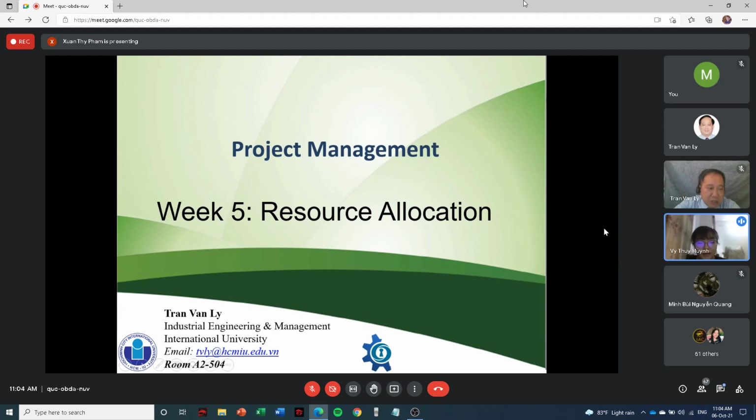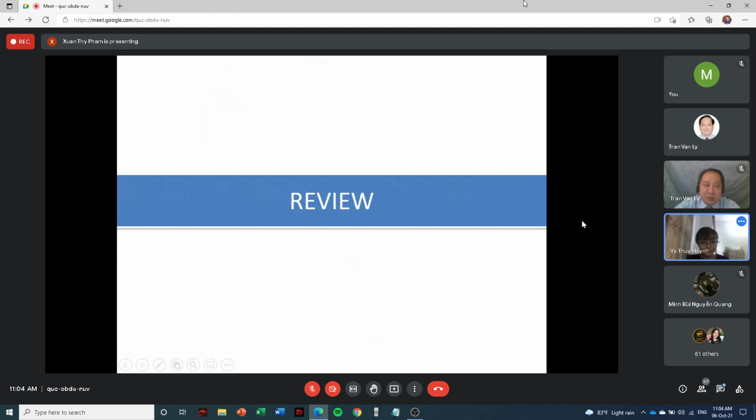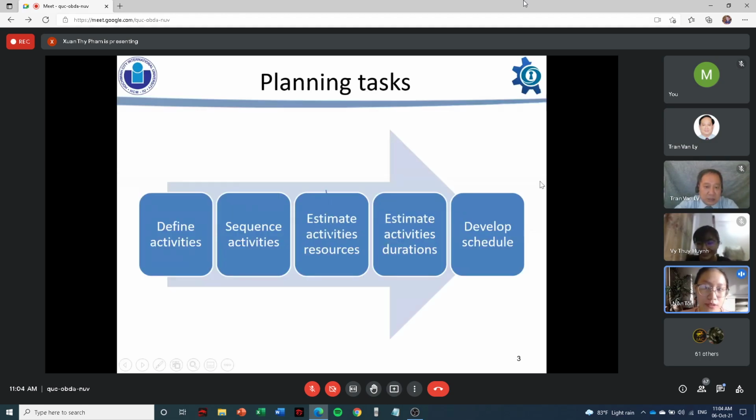First, we will start with Minh Uyên for the last week review lesson. Thank you. Hello everyone, my name is Uyên, and before the content of this chapter, I have a small review section for you. Next slide, please. About the project time management plan, we have 5 steps: define activities, sequence the activities, estimate activity resources, then estimate activity durations, and finally develop the schedule.